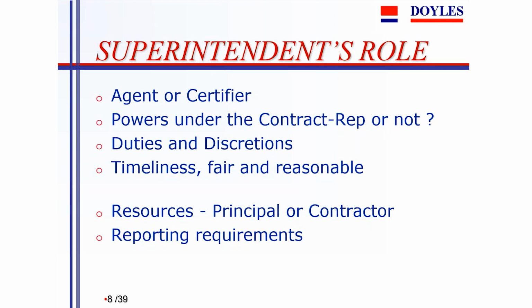Previously, the obligation on a superintendent was timeliness, being fair and reasonable in his assessments. And that's still to be found in the AS 2124 family of contracts, where that is expressly provided to be what the superintendent will bring to the contract. But increasingly, that's being written out in more modern contracts where principals are wanting a hard-edged role for the superintendent. We go to the next slide.